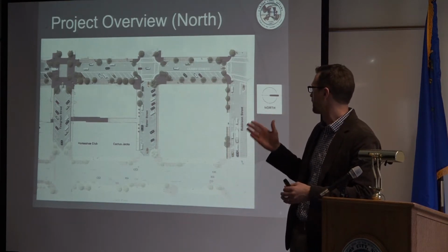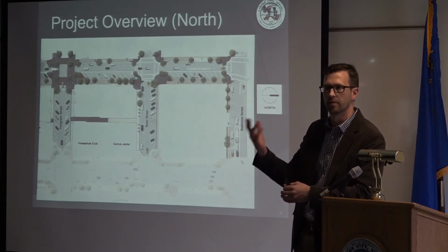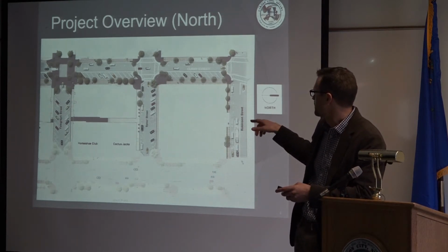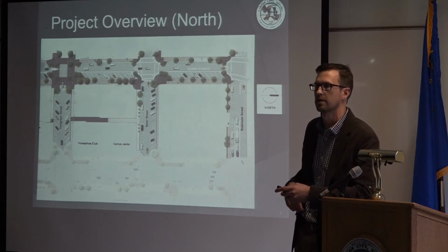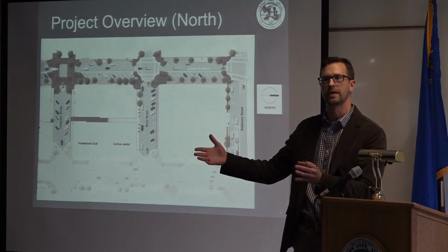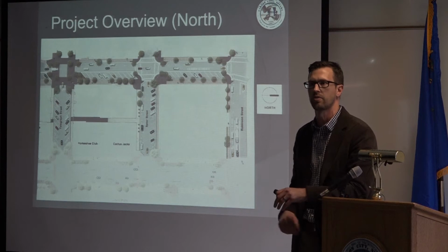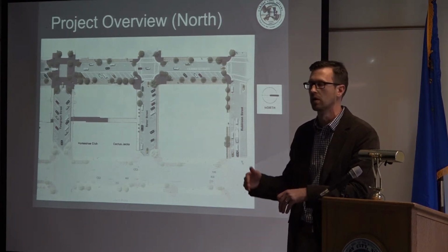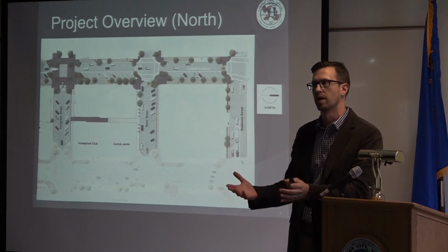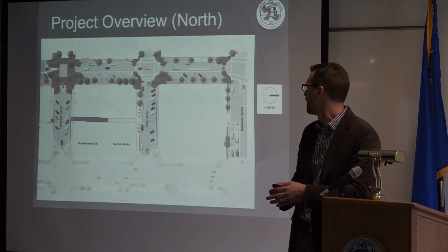What happened fairly recently, around October, November, is that the redevelopment agency approved some funds to address the cross streets. So you can see Robinson, Spear, Telegraph, Proctor, and Musser are all going to get beautification improvements along with this project. The project somewhat expanded in scope with the new funding. On those cross streets, there'll also be some pavement reconstruction. A lot of the utilities run east-west on those cross streets, so with those improvements, we'll be doing the utility upgrades in that area.